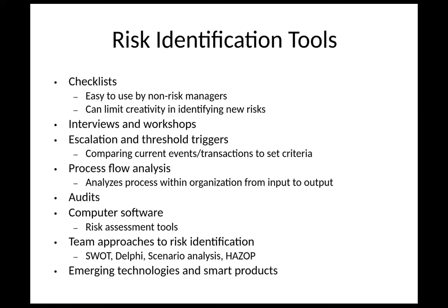And the idea is where these other tools, doing interviews, might be me doing that particular kind of identification. The team approach is to get people that have expertise in different areas. So maybe you get HR, you get legal, you get operations, and you try to take a look at a particular risk or problem and get input from everyone to get a better idea of, is this a real risk, or is this something that I'm thinking will likely happen, whereas in reality, from an operations standpoint, it's not that big of a deal.